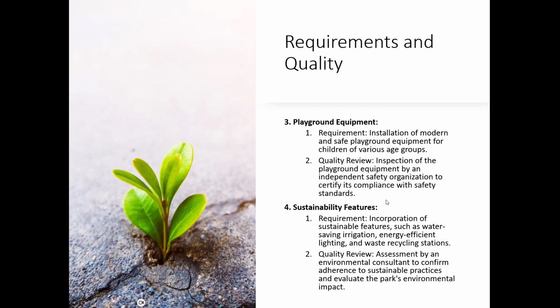We look at sustainable features, so incorporating sustainable features such as water-saving irrigation, energy-efficient lighting, and waste recycling stations. If we were to do a quality review of that, we might engage an environmental consultant to confirm adherence to sustainable practices and evaluate the park's environmental impact.